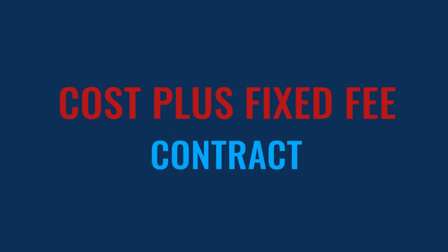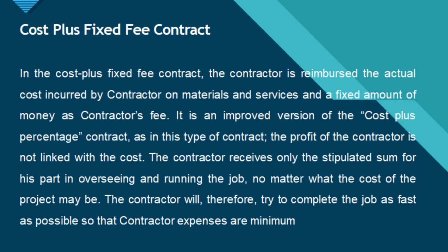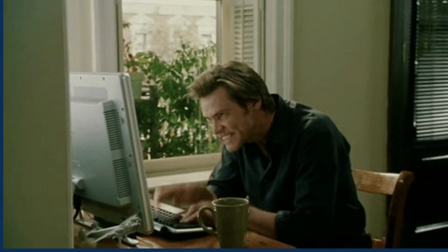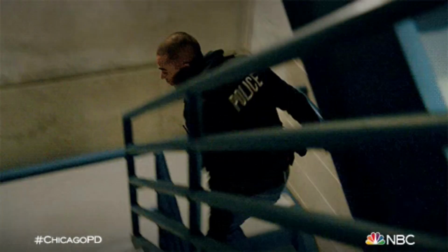Cost plus fixed fee contract. Cost plus fixed fee contract is improved version of cost plus percentage contract. In this contract, contractor receives sums from client based on project coordination and running the project only. The contractor, therefore, to gain more profit, will try to complete the project as soon as possible with minimum expenses.